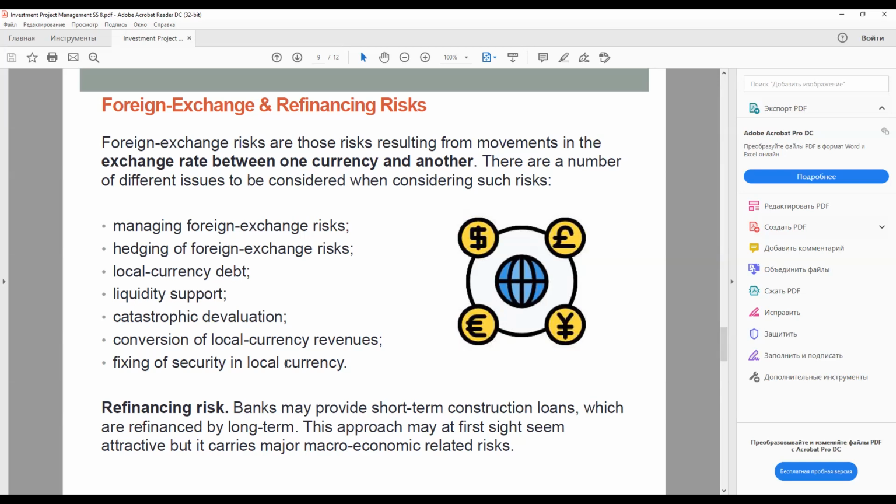So what can we do? What about exchange rate hedging? It is theoretically possible for forward foreign exchange contracts to be used to cover currency exchange rate risks. With this type of contract, the project companies that had construction costs in euros but funding in dollars could agree at financial close to sell dollars and buy euros on the estimated loan drawdown dates, thus fixing the exchange rate at which euro costs are being funded in dollars.